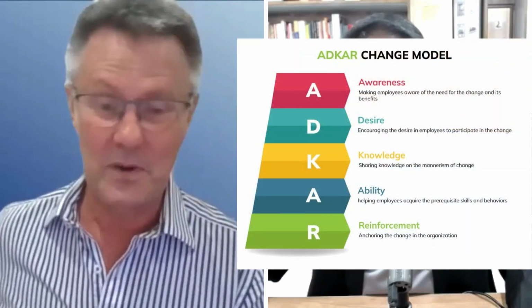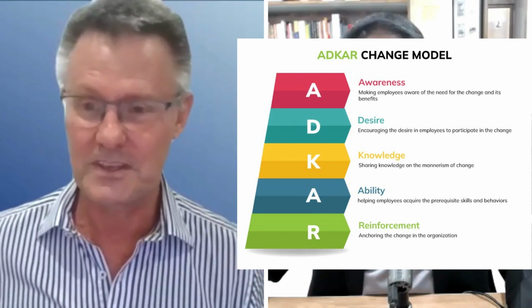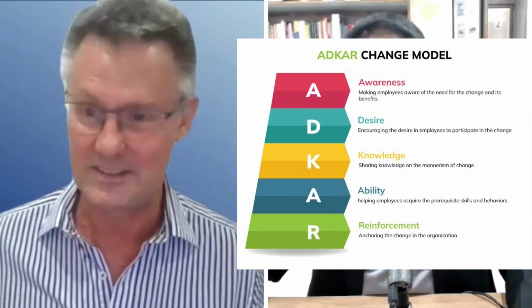That's the first thing. The second thing is early communication. You really do need to, if you subscribe to something like the Prosci ADKAR technique, which is fairly widely used in change circles, the very first thing, the A in ADKAR, is awareness. So it's really that early stage of making people aware that your project is there. And that comes down to talking in the language they understand. Do you have to have a town hall where you stand in front of everyone? Do you need to send out an email because everybody reads email? Is it something that goes out via Instagram because that's the way your company works? Whatever it is. So communication is the key, essentially.